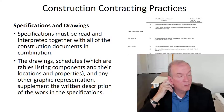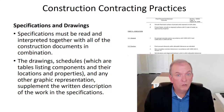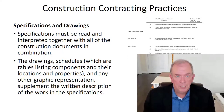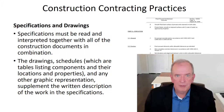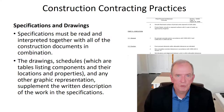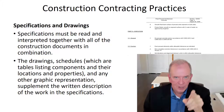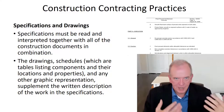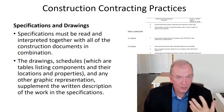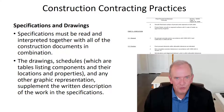Specifications need to be read very thoroughly. One sentence in a set of specifications can give you quite a different result. I've sometimes gotten complacent when pricing projects and missed a line in the specification — later on it hurt, because I assumed a certain price and it ended up being substantially more. There's an old saying: when you assume, you make an ass out of you and me. You've got to be very thorough and look through things very carefully in construction.